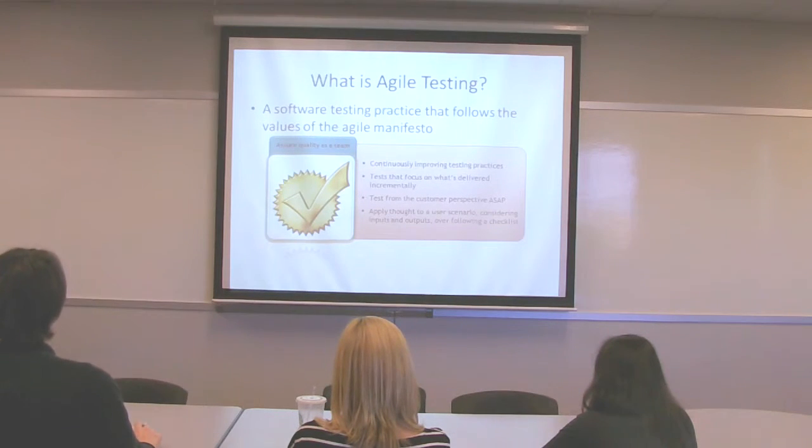Although it's not getting implemented every 2 weeks, we have decided this is what needs to be done, and the whole layer of the cake, the whole functionality, will be developed completely and tested at the end of the 2 iterations. At the end of every 2 iterations we have a show and tell wherein the business can come in and see what's happening.